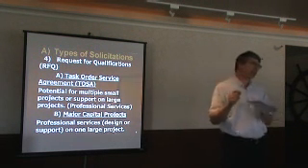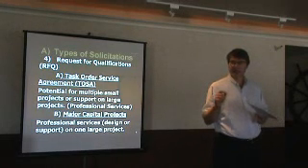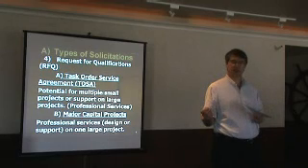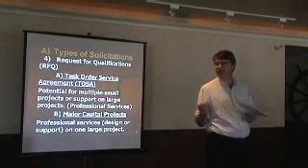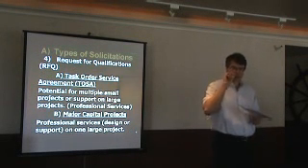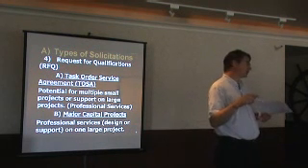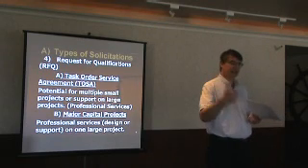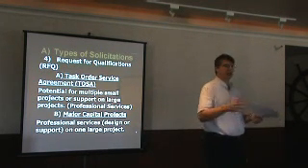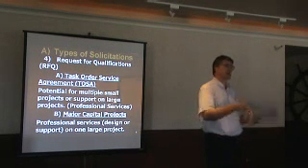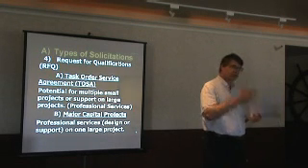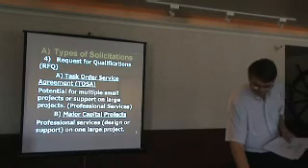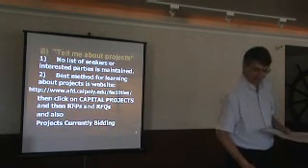If you're selected under this RFQ selection process, which you're not bidding a price, you're providing rates, but also skills, resumes, qualifications, experience, you're guaranteed exactly $0 worth of work. Then if we select to use you, and we may select multiple TOSA entities, you get work piecemeal from time to time. On major cap projects, you may see us go out to bid looking for somebody to be geotech and special inspections on the meat processing center or on the recreation center. So it's a specific project, and it would be limited to that. And those are professional services.